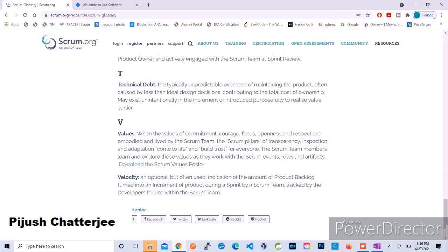The main reason is that story pointing itself is a relative process. Every team can point a story based on their understanding. There is no fixed rule that for exactly this definition of a story you will get 5 points or 8 points. It is up to the team members how to point the stories, and if everybody on that particular team follows a similar standard, then you can measure whether the velocity is increasing or decreasing.